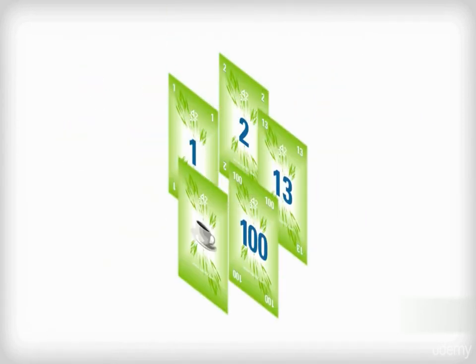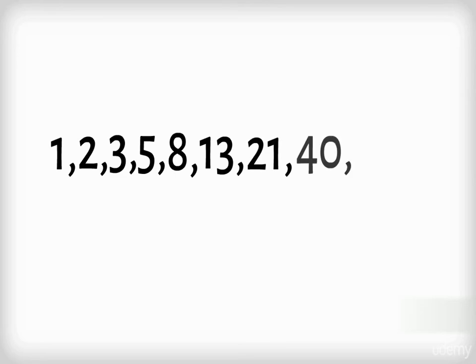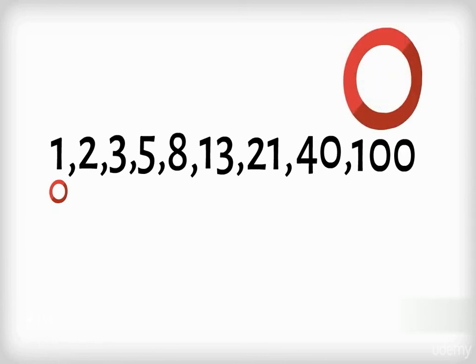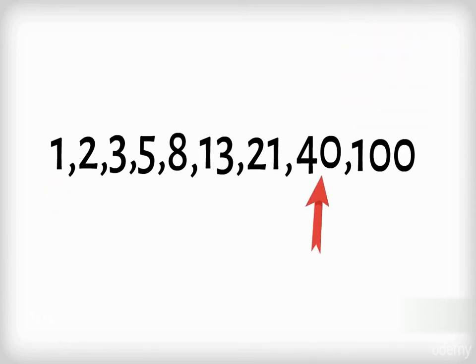Agile planning poker cards are the artifacts used to estimate user stories, and they use the numbers below: 1, 2, 3, 5, 8, 13, 21, 40, 100, where 1 is the smallest in relative size and 100 is the largest. A 40-point story would be roughly twice the size as a 21-point story.